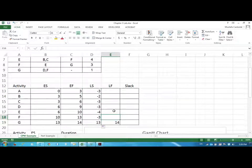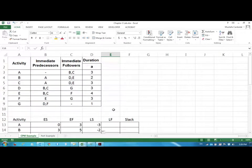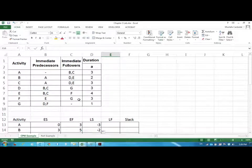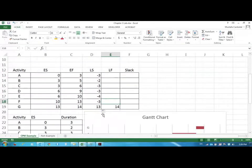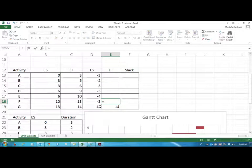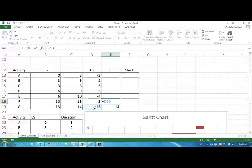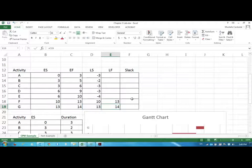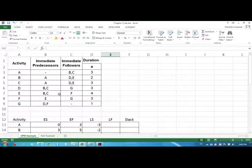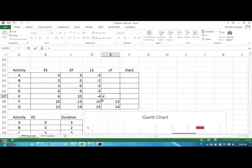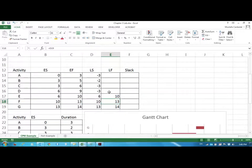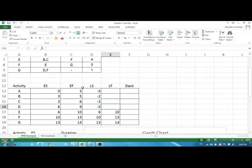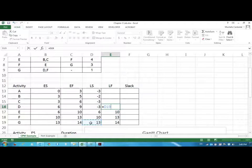So the late finish for F. In this case what we have to do is we have to look at the immediate followers column and F has a follower of G. So F should not delay G. F has to be done by this time. The late start time of G is the late finish time of F. And I look at E. E has a follower F. So it has to finish by this time. Then we look at D. D has a follower G. So it has to be done by 13 as well.